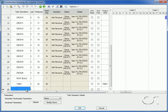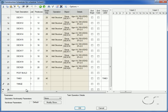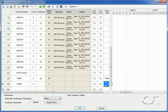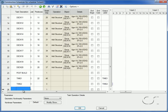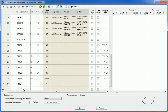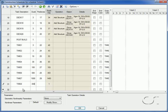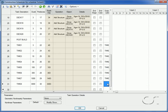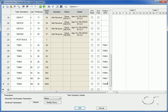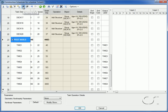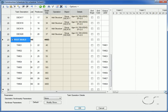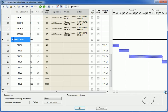Continue adding time tasks, with the last task having a duration of 3,000 days. Older concrete is less sensitive to time and thus may have a longer duration step. It is important to realize that task duration can have a significant impact on creep calculations. Select the post build task and click on the 'decrease indent' button to identify this task as a summary task. We can see the relationship between tasks including summary tasks and subtasks.